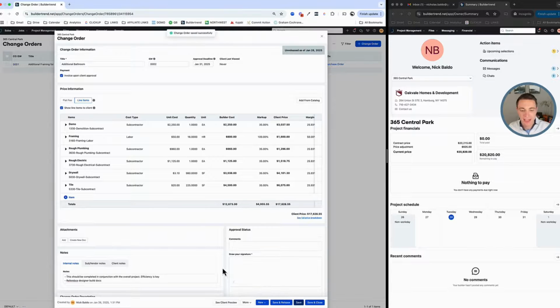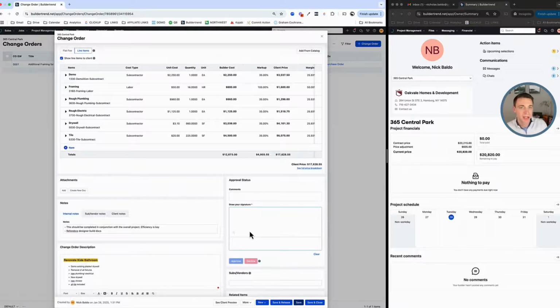There's some cases where it makes sense to approve on your own, especially if we have a customer who's like, hey, listen, you're good to go, right? Go ahead and do that. I don't want to be dealing with all the minutia of signing off on it and all that. As long as you have some kind of agreement, you know, meeting minutes or something that says we have that agreement, you can do that and approve it here. We're still going to have the documentation, which is the most important part.